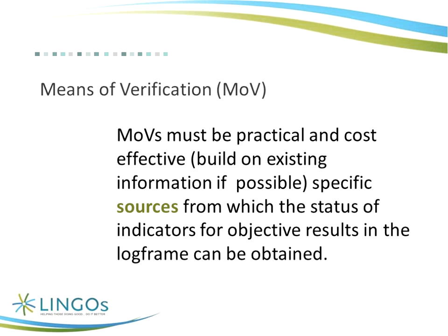Moving on to the rest of the log frame, the means of verification. This is not really too complicated. The means of verification are the way that you're going to measure the indicators. They've got to be practical, cost-effective. Sometimes I see household survey on log frames, and that's fine. But just the realization is that a household survey is an extremely expensive, time-consuming type of measurement.